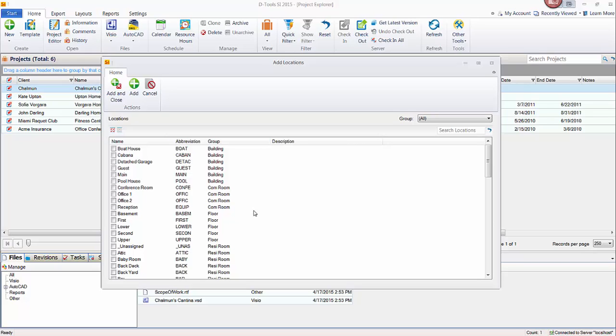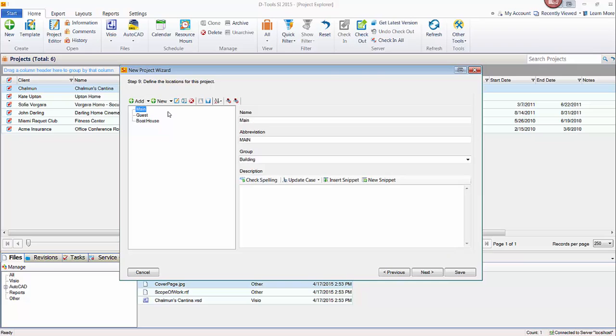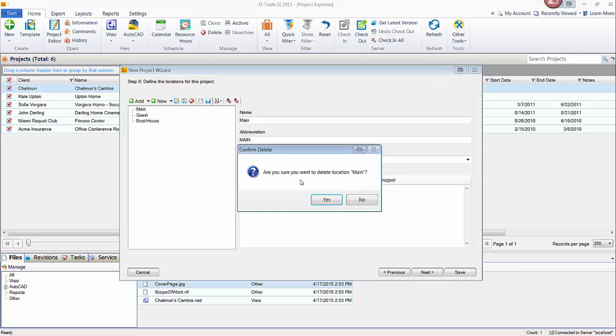So what level you start at is going to be up to you. So you don't have to have a multi-level or locations with sub-locations if it's a smaller job. But there are going to be jobs where you might want to identify it. Example being, let's say you're doing a boathouse, a guest house, and a main house. This was a resi example. You might put the buildings first. You can put these in the order you want them in. And beneath this we might then add sub-locations for then floors and then a sub-location to that for rooms. Or we could go directly beneath the main house, just list floors. That being the ultimate location, just to identify these separate buildings on a job. Or you might just do floors and then rooms. It's really going to be up to you on how you want to present and stay organized.